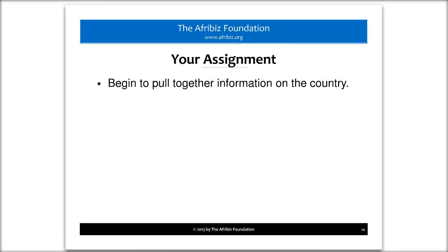And again, that idea stage, the project definition, the concept document, and the pre-feasibility really are going to be quite iterative. But I will say that once your project definition is at a decent level, you then automatically move into the concept document phase. That will go through many iterations, for example. But once you've got sufficient to pull that document together, then you can start working on the pre-feasibility. So you're not necessarily going all the way back up, but within each stage, you are being iterative, okay?